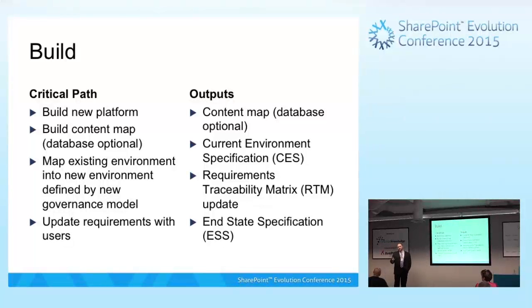Ed, volume of content is also important. But surprisingly, from a migration perspective, it's less important because, again, the biggest crux, and I'm getting further into my presentation earlier, is that the difficulty in migration is not about moving data. It's not about how fast you copy information. It's not about how much data you have to migrate. It's about moving your users and changing their behavior.